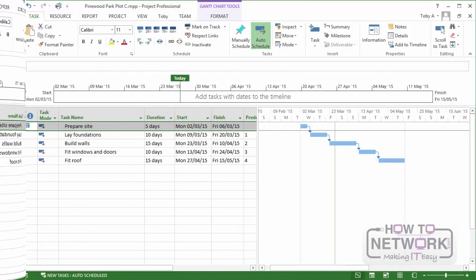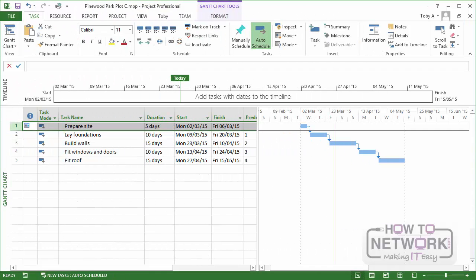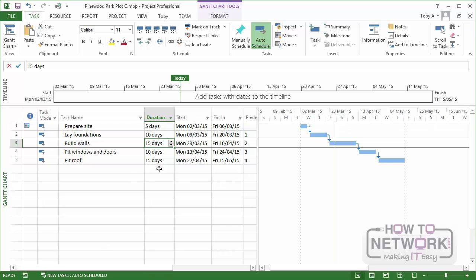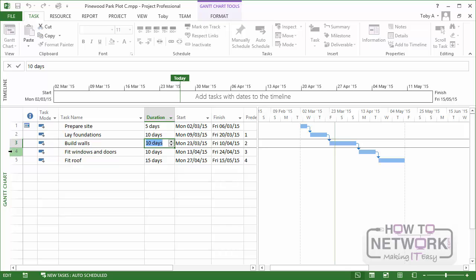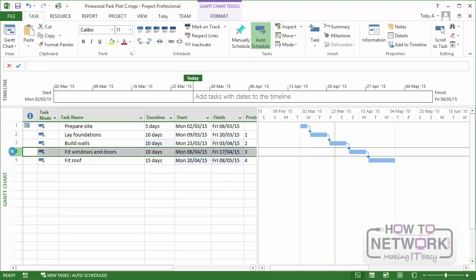Now let's look at a simple example of how constraints can work. Let's suppose that we've got the schedule you can see here, but the building of the walls is actually a much quicker job than we'd planned. And by putting some extra people on the job, we get it down from 15 days to 10. So let's just put that down to 10 days. Look carefully at the Gantt chart and the other dates when I do that. What happens is that it pulls the whole project in a week earlier than was originally planned.